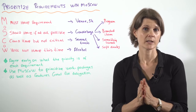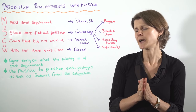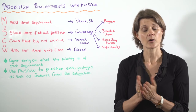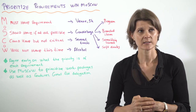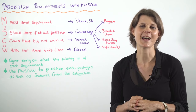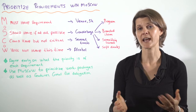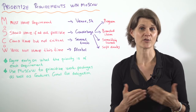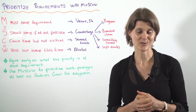You say we must have a copy of the conference program. What should we have in there? We should really have a branded item, maybe like a pen or something like that. What could we have? We could have something sweet, but it's a nice to have — it's really not essential. What will we not have? You decide you will not have any soft drinks or water because it will make the bag too heavy.